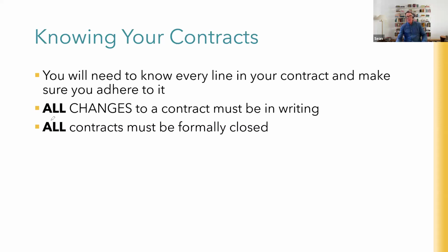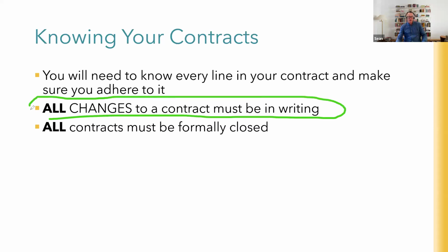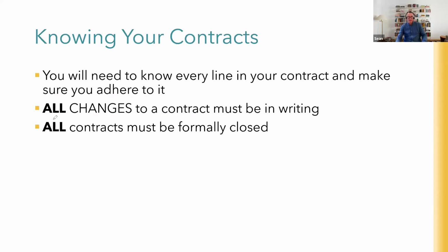Back into it though. So yeah, please make sure you change all contracts in writing. No handshakes, no verbals. They can start with verbals, but they've got to end up in writing. And all the contracts technically have to be closed. Did you know that? Most aren't. They just sort of stop. You pay them, they do some work in that.